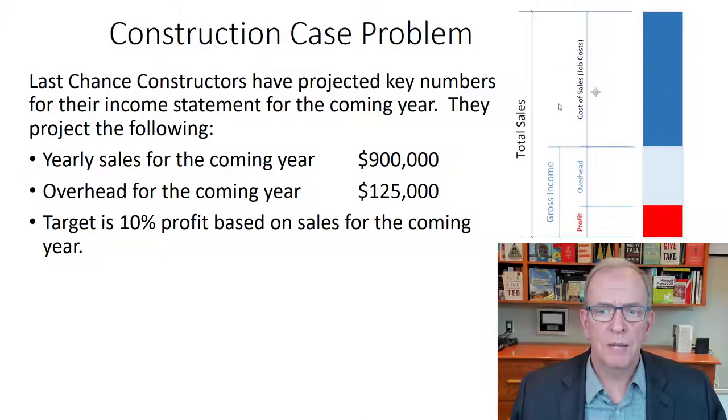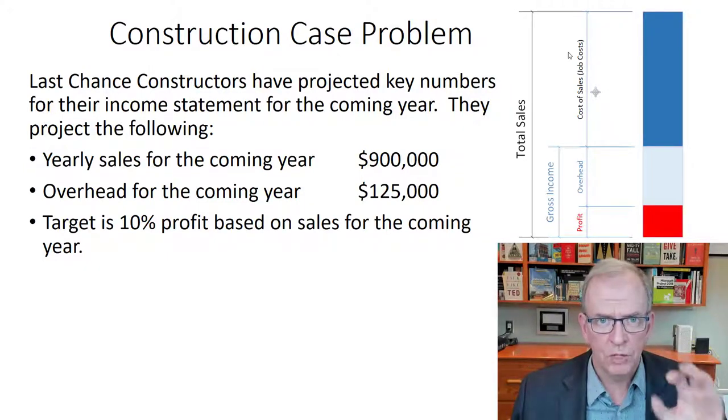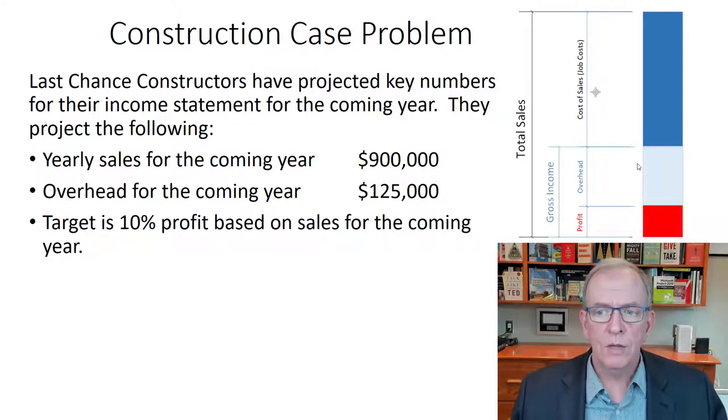So your income statement really shows total sales, in this case your projections for the year, and your direct costs: what the actual projects cost for you to construct them, the direct labor, the subcontractors, all the materials, all the setup stuff you need for the individual projects. And then you have your overhead. And don't forget about your overhead.